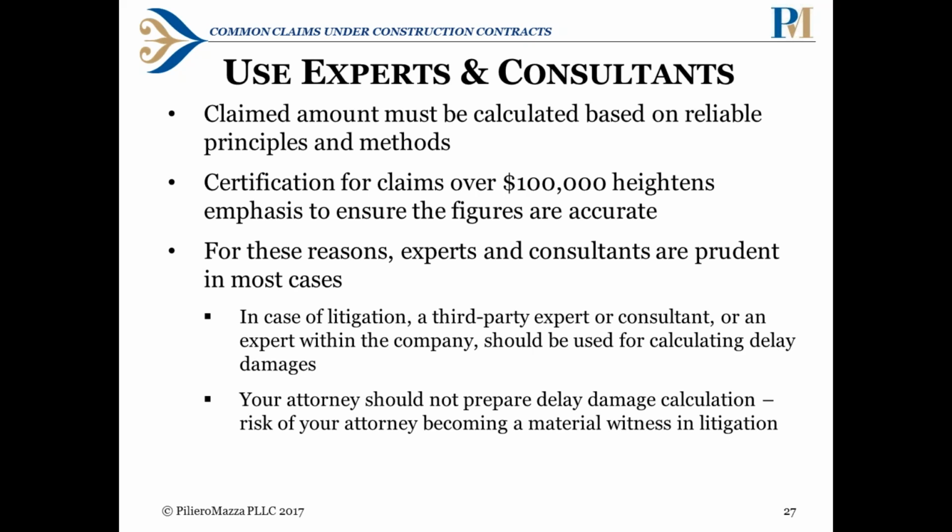The government can bring fraud claims against you. It doesn't happen that often, but when contractors submit claims they do not believe are true or accurate, or they play a little loose with the numbers, you're opening yourself up to liability. So you need to be careful here. So using an expert to help you nail down those numbers is good practice.